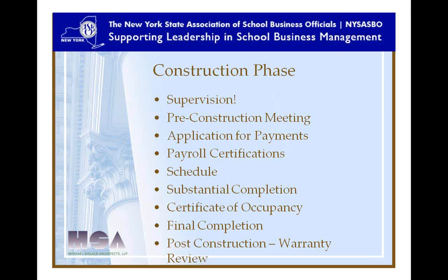Substantial completion is always a fun time. Everyone has a different definition of what substantial completion is. To contractors, it's when they think they're done, but the legal contracts have some pretty clear definitions. It's when the building is ready to be used for its intended purposes, and means all the life safety elements are in place, all the heating and cooling systems and the emergency exiting systems are all in place.